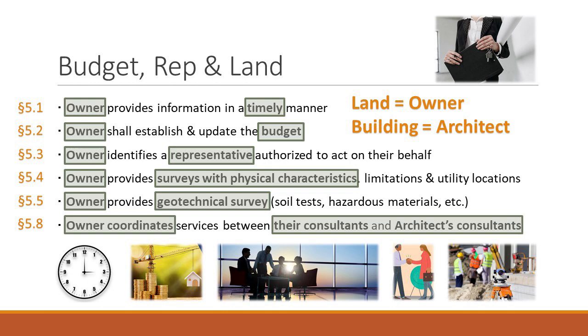So we had language as to our sustainable objective, but it wasn't necessarily a LEED objective. So whatever those are, you put this in this separate document, the E204. It's an entirely separate document. You put those as sustainable objectives, and whatever obligations are identified in there for the owner, they must fulfill those.